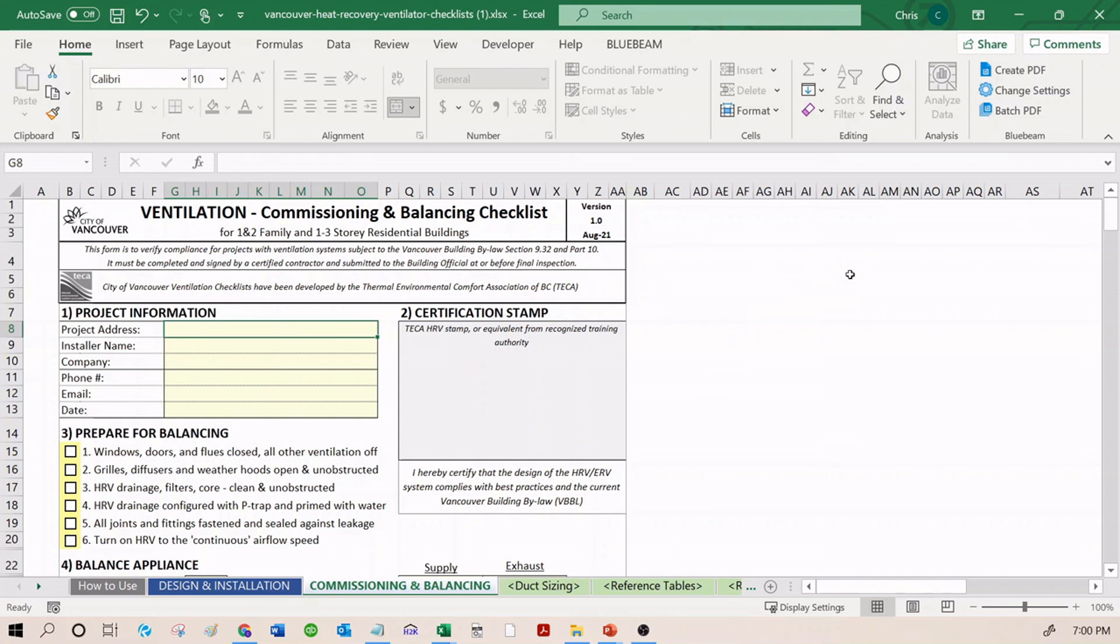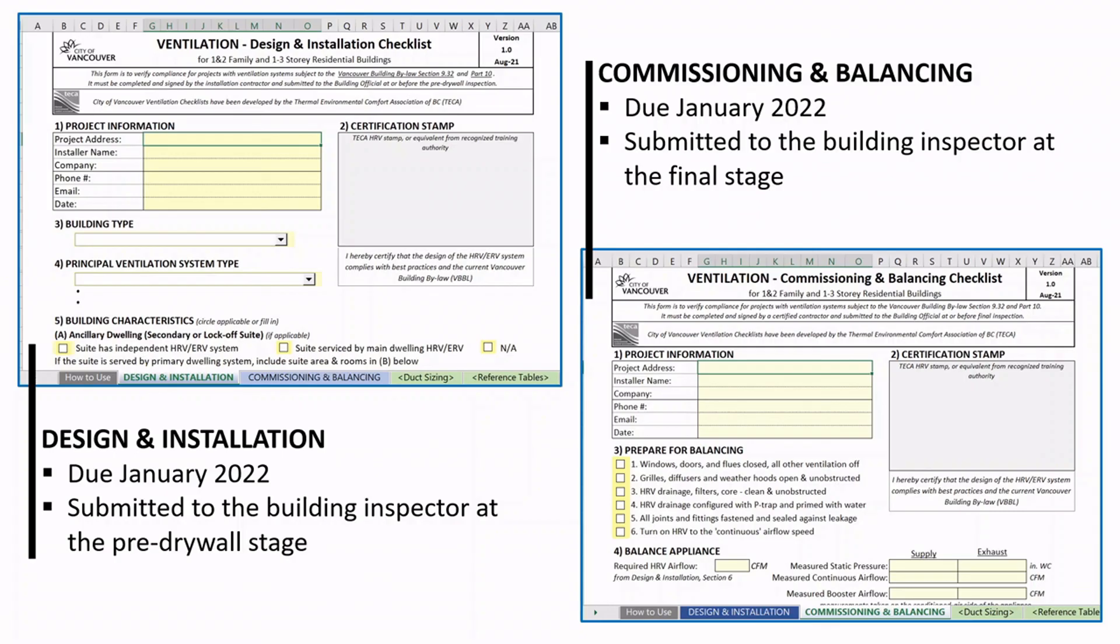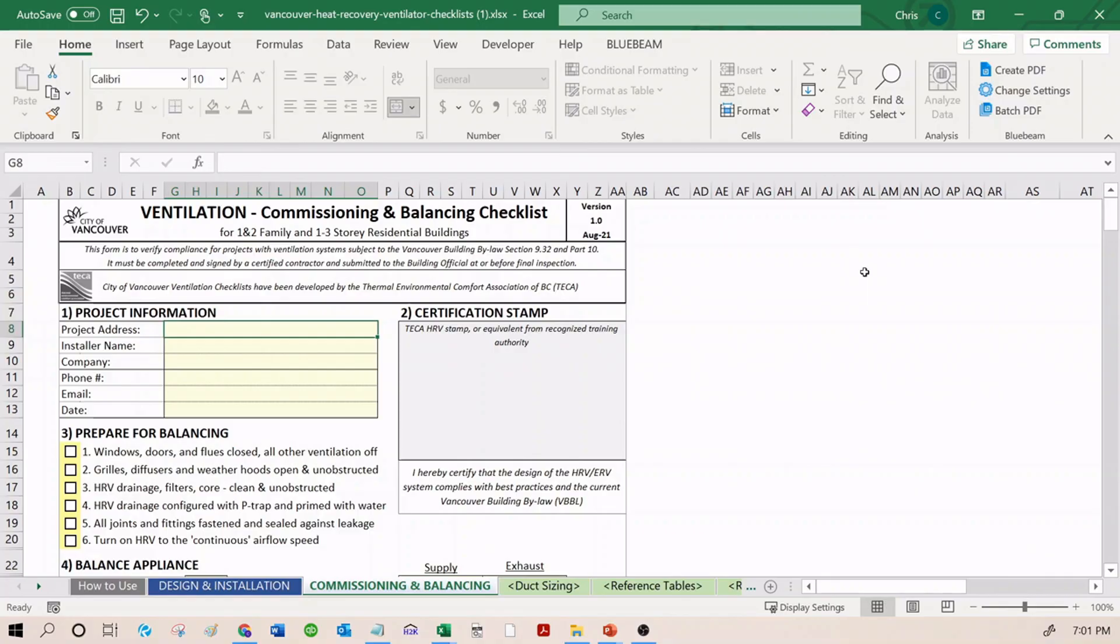We showed you what they are. We told you when they are due. They are due January 2022. That is when they are going to become mandatory. The Design and Installation checklist needs to be submitted at pre-drywall. And the Commissioning and Balancing checklist needs to be submitted at final. Both of these checklists are getting submitted to the building inspector. The way these checklists work is that they go through all of the requirements and it is the responsibility of the installer to confirm that the system has been installed according to protocol. The inspector is not going to go through each of the bullet points and confirm this on their own. They are going to take your word for it.